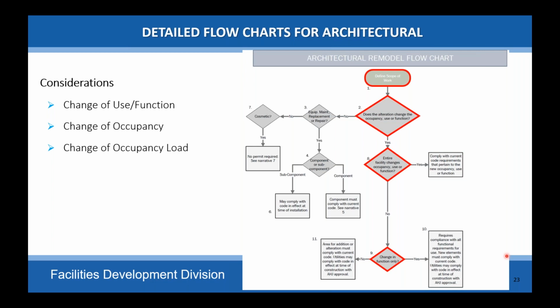If it is a change in function only, this requires compliance with all functional requirements for that new use. So the section that you're applying, be it med-surg, pediatric, ICU, the requirements of that section have to be applied, the functional requirements. New elements must comply with current code. Anything new going in, other than a subcomponent for repair or maintenance, must comply with current code.